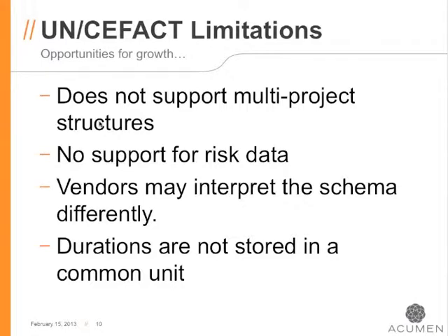One final item, this is down in the weeds a little bit, but it's pretty important. The way durations are stored in CEFACT right now is they're not stored in a base unit. One popular scheduling tool, MS Project, although you see the duration on the screen in days, it's actually storing the information in units of minutes and then massaging how you see it on screen based on your preference. The way durations work in CEFACT today is they're not based on a base unit. So although many of us do use days in our scheduling tool, it's entirely possible we might be in an industry that's driven by hours or even minutes, and comparing different projects against each other using the CEFACT format, it's not immediately apparent what the base unit for the durations are.